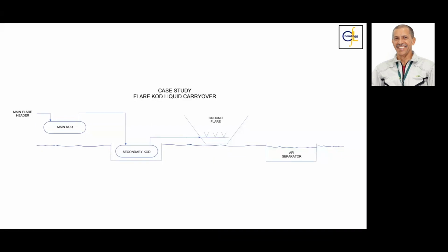But remember that we will also have to invest in this recovery plant, which most of the owners don't want. So the best idea, if you are dealing with a new plant, or with an old plant but you are working on revamp plans, is to try to introduce that idea during the evaluation of the cost of the project. Don't do it after, do it before.